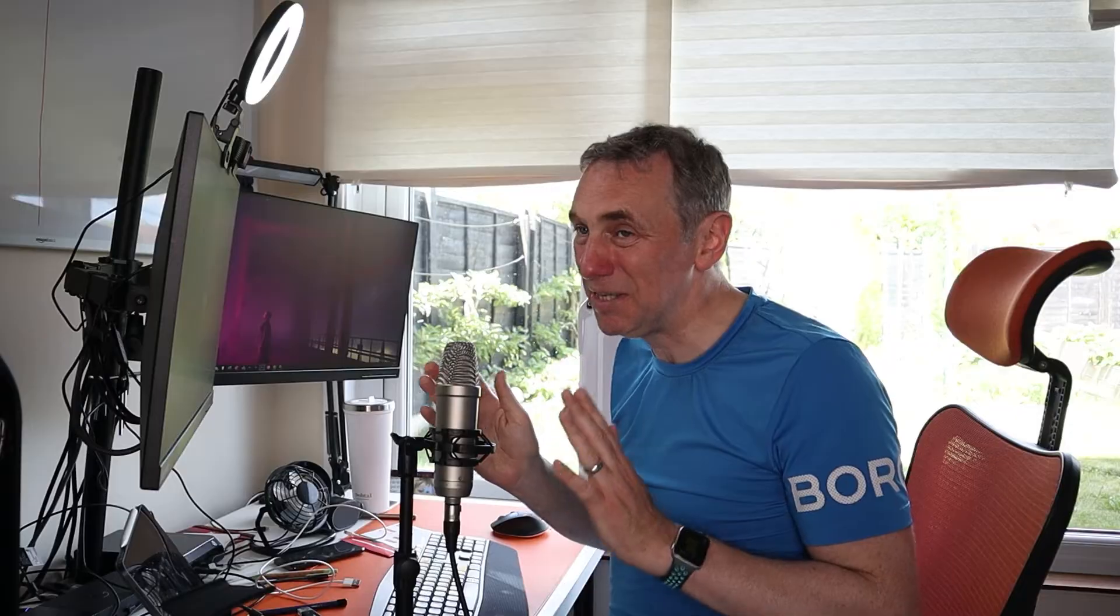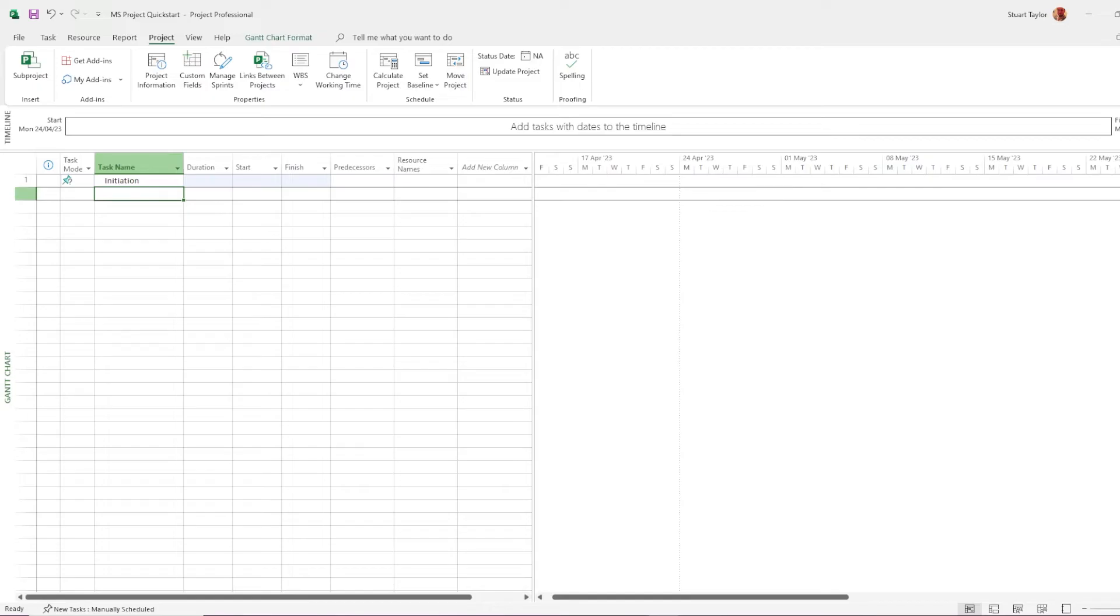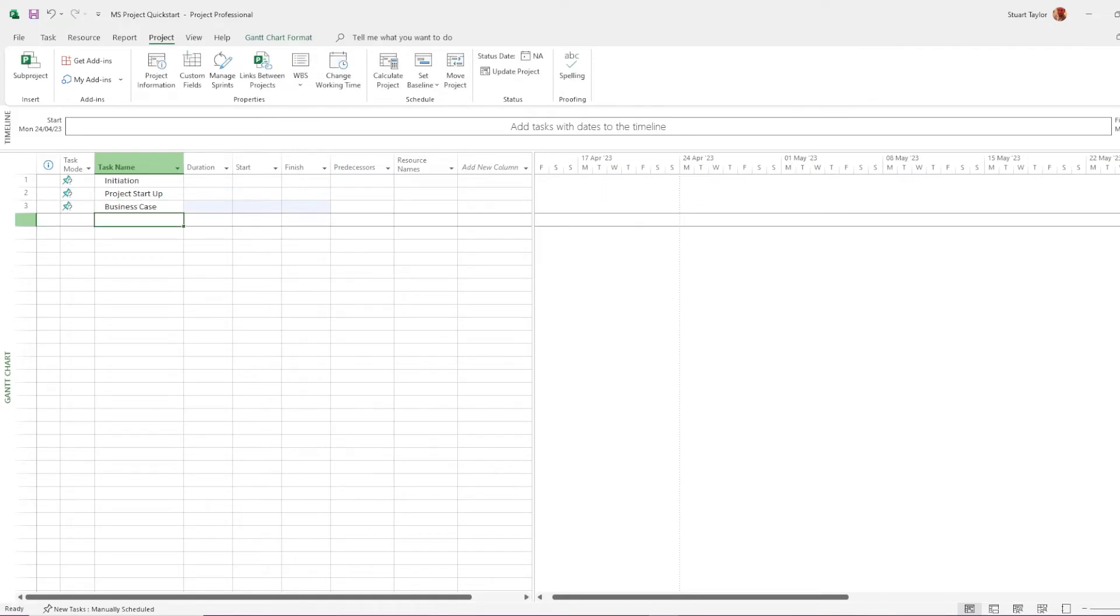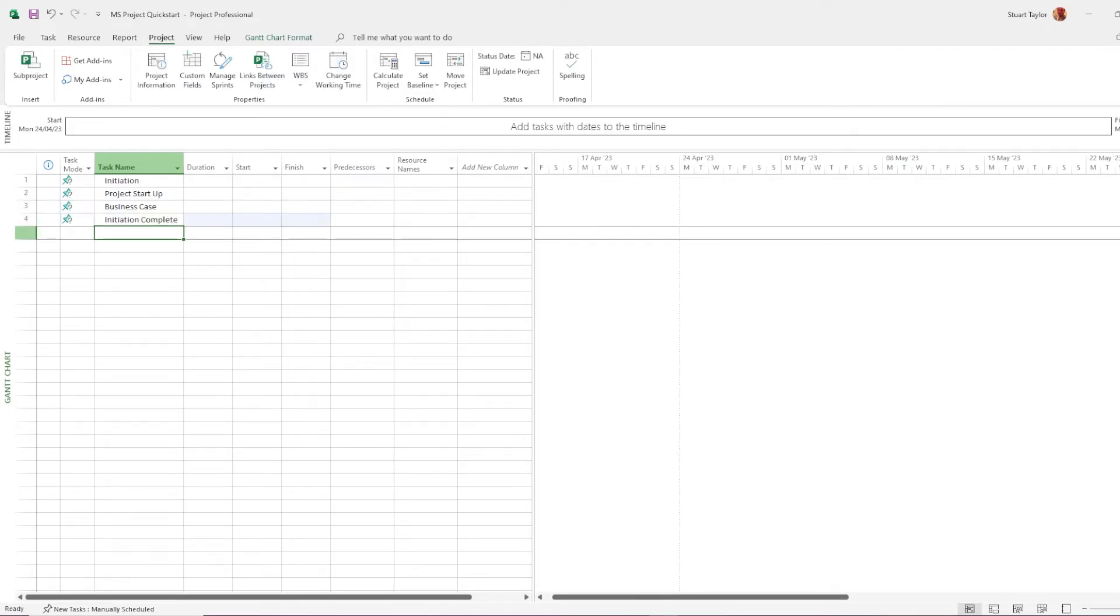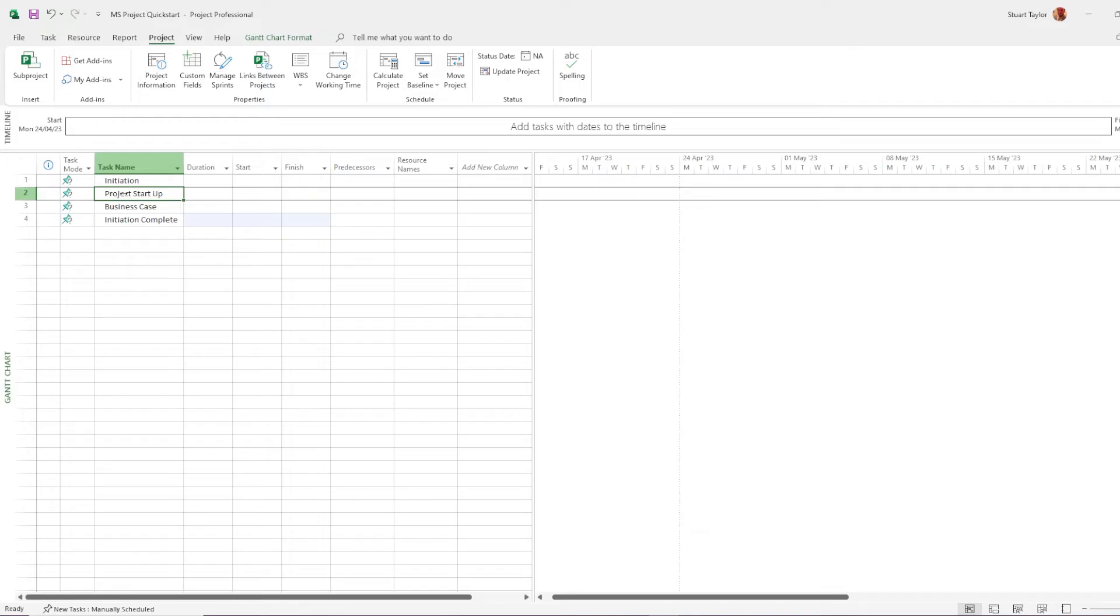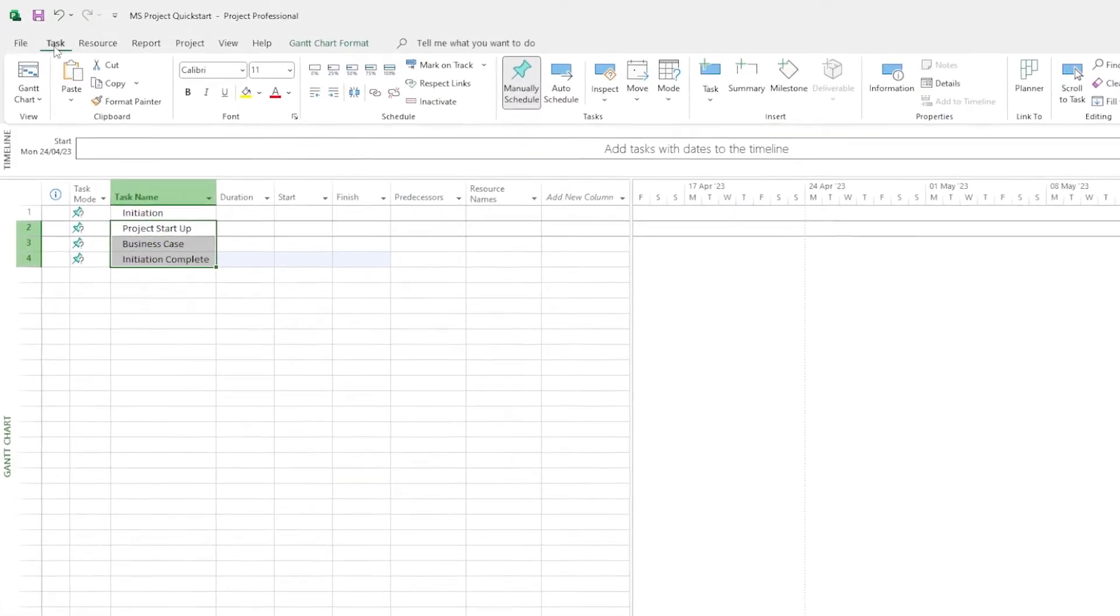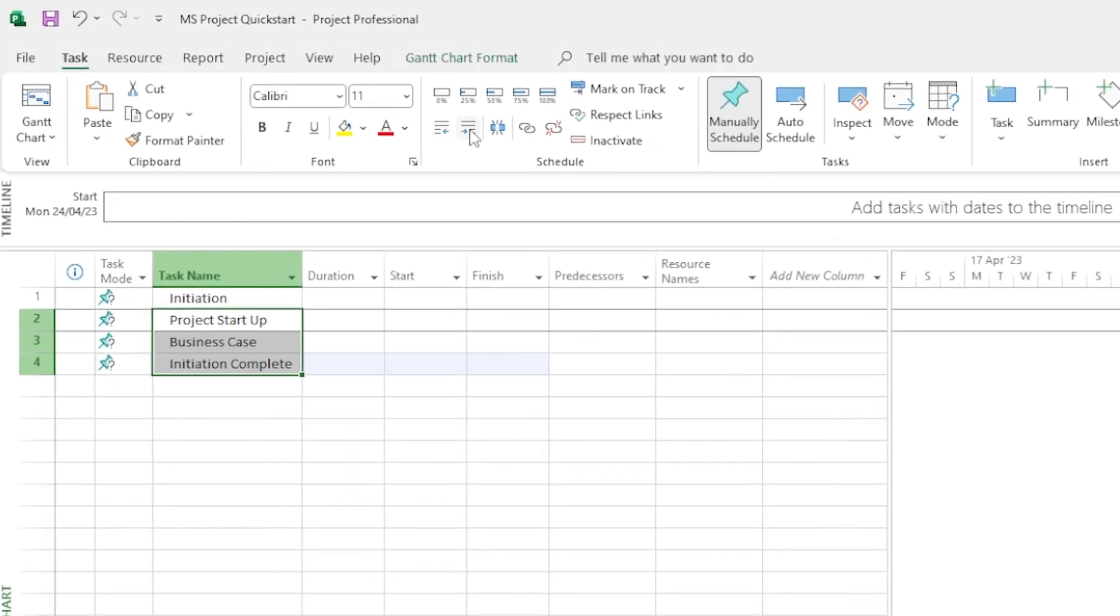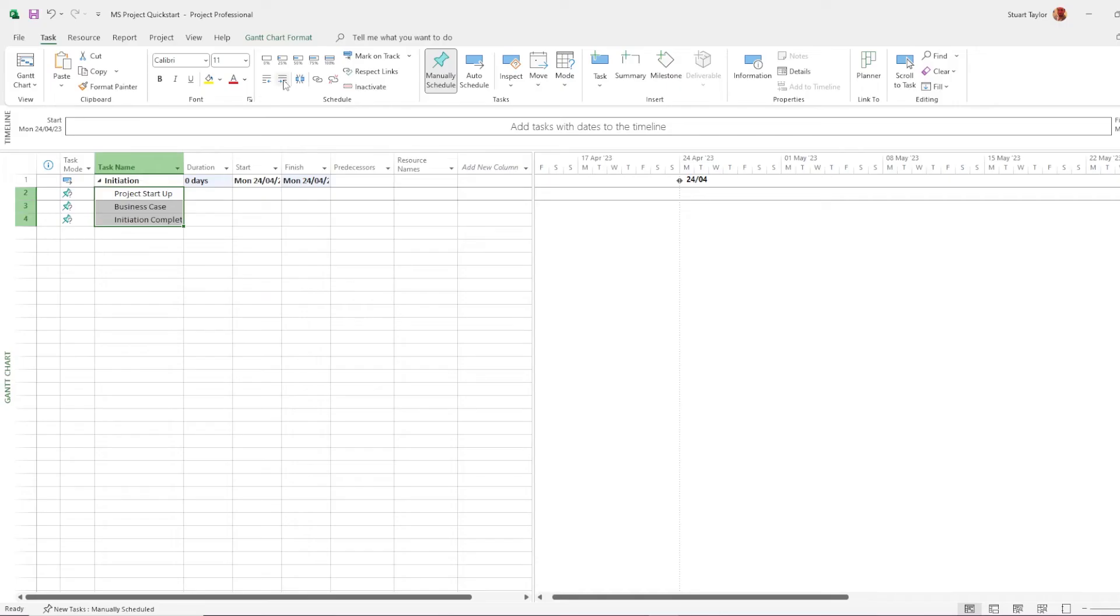That was the boring part. Now we're on to the interesting part. I'm entering the name of the first stage initiation into the task name column. Underneath it, I'm just listing the other tasks that are part of that stage. And I'm including a milestone to let us know when that stage is completed. Select the tasks that are part of the stage on the task tab and press the indent button once. Now you see that they've become nested within that stage.